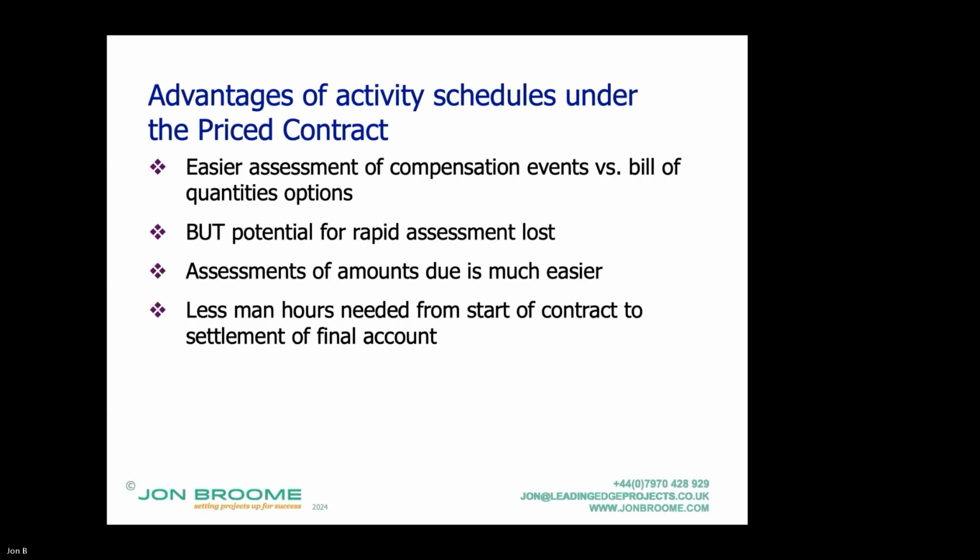Yeah. And that's one of the things about NEC, going back to the stimulus to good project management objective. You are managing the contract rather than just administrating it for a big bun fight, and settling things as you go along. So you might well need more man hours during the contract compared with other JCT and FIDIC bills of quantities options, but less overall was my research feedback years ago. Zach, you've been very patient.